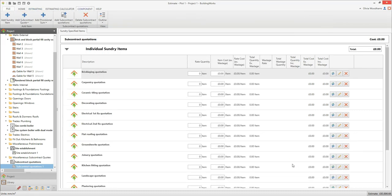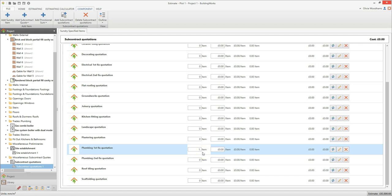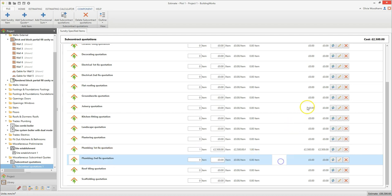Like the site establishment estimating calculator, the subcontract quotations estimating calculator is a list of sundry costs. Start by locating the appropriate quote type. In this case I'm going to use the plumbing first fix quotation. Type the number of items into the rate quantity box — usually this will be one. You can enter two if you want to duplicate the quote for any reason. Then enter the subcontract quotation into the item cost box. You must put a figure into both of these boxes for the cost to be added to the estimate.